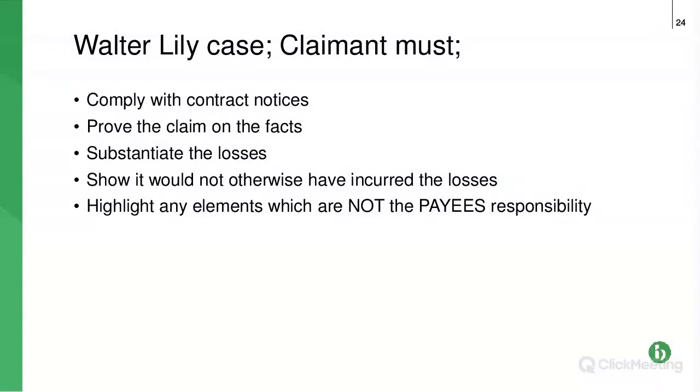But this is your key case law in terms of those notices that I've been saying are so important, and they are important. But this case gives you a little bit of leeway if you haven't quite sent formal notices out. But, and this is a big but, you have effectively informed the PM, the contract administrator, or whoever.